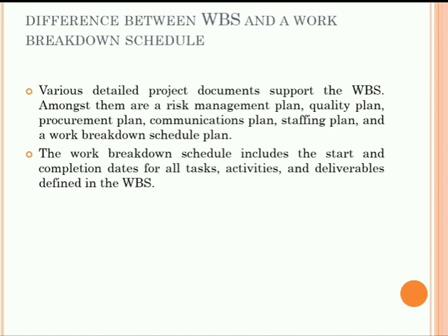The next element we can consider is the levels of the work breakdown structure. Work breakdown structure levels determine the hierarchy of work breakdown structure elements. Most work breakdown structures have three levels that represent the project's main deliverable: control accounts, project deliverables and work packages.